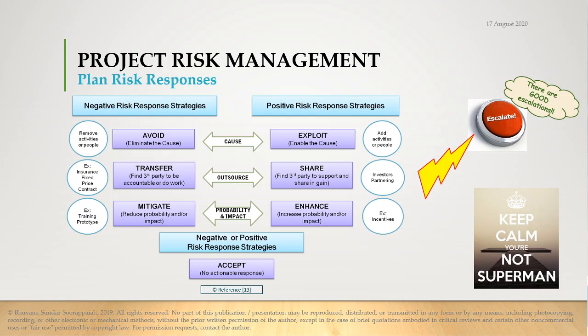What are they doing? They are reducing the costs. Imagine, just rebuilding a small model and showing you, or redesigning the 3D software model and showing you, does not cost much compared to redefining and redesigning the entire full scale model. So they are reducing the impact of the risk that they have to redesign something. This is a prototype.